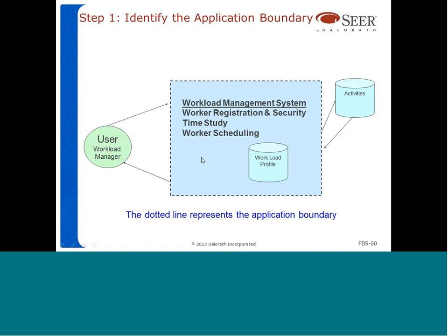So step number one, remember, is identify the application boundary. The application boundary is basically an imaginary boundary that surrounds the application, and it identifies what information is stored internally to the application and what information is stored externally to the application.